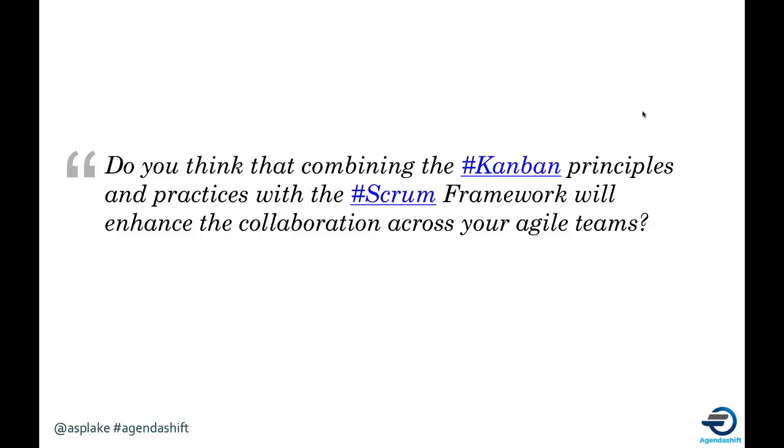The trick when you've got anything that you want to be managed differently to anything else is to make sure that that's visible in some way. So we used different coloured flags to indicate different kinds of dependencies. Dependencies between teams, dependencies on different kinds of external stakeholder, for example. And we used visualization to indicate pieces of work that need to be got through the system quickly for whatever reason. So we could use a swim lane for that, or different coloured stickies.